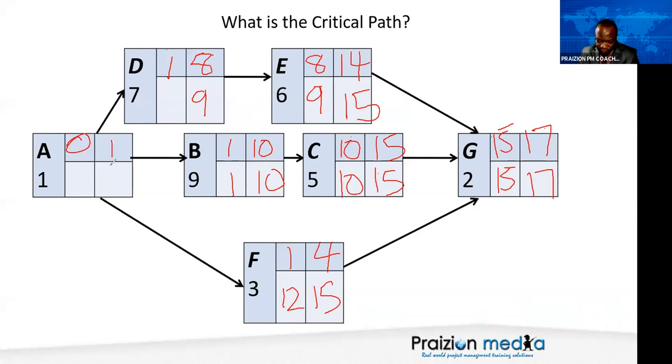Late start for D2. Thank you very much. And now on the backward pass, you've got a 12, you've got a 1, you've got a 2. The rule says always choose the what? What is the rule on the backward pass? Always choose the what number? The lowest, says Jan. Very good. Lowest, says Greg. Okay. And the lowest number you choose is, drumroll, 1.